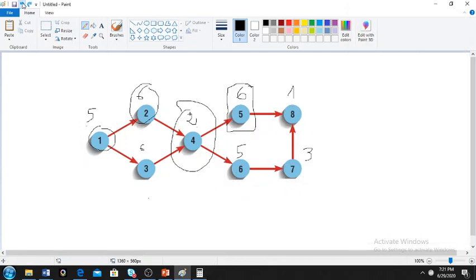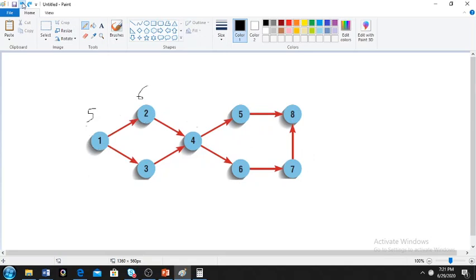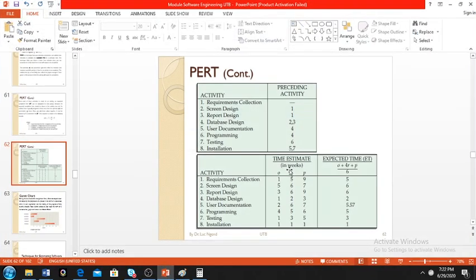Now let's see what we get when we use PERT. When we use PERT, instead of using only realistic, we use optimistic and pessimistic. With CPM, O and P do not even exist. They are not there. So you just give your best scenario, your best case. With PERT, you add in the notion of optimistic and pessimistic, and then you calculate. So with PERT, you use this after calculation.